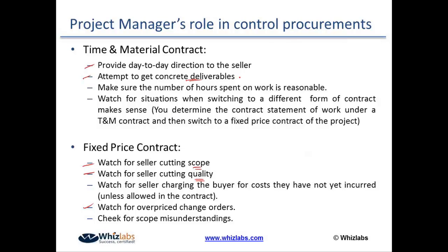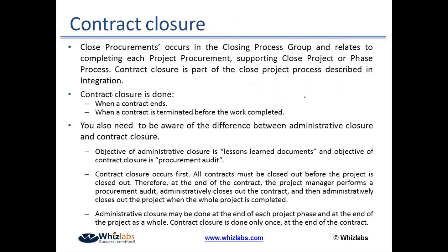So let's say you decide that the maximum time for RCA, the root cause analysis time frame, is, let's say, 5 days. Once the root cause analysis is done, then the solution design, okay, that is another 5 days. So this kind of a time frame you might have, Binu, but you cannot really have a full and final project schedule like you can have in fixed price contract. So this is the project manager's role in planning and administration and controlling of procurement.